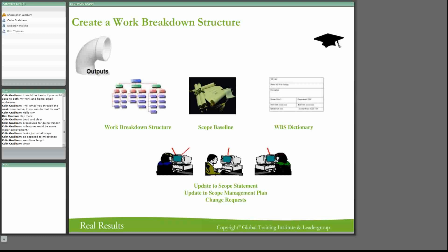We're probably going to have more detail in our work breakdown structure at this stage of the project. So I told you we're going to go through iterative processes. So although in our scoping activities we're going to create a work breakdown structure, in this stage we are going to refine that even more. So that decomposition, that's what we do when we call a breakdown structure. The word that we would actually use there would be decomposition.